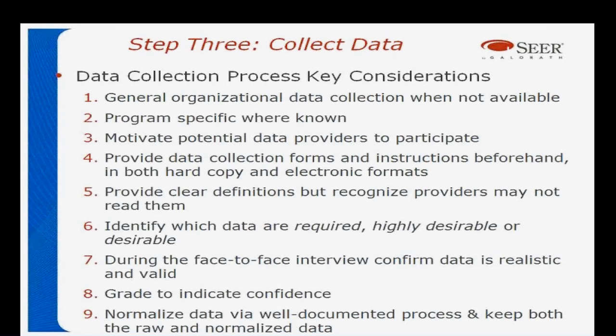And then grade the information to look at the confidence. For example, if you're using an external database for sizing, something like ISBSG or the Gartner database or something, it might be that we find some data points that are in some ways similar but are significantly different due to reuse or something. Identify and rate the confidence you have on those being viable.